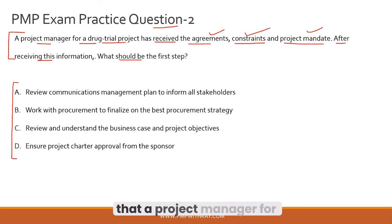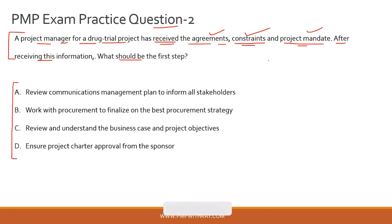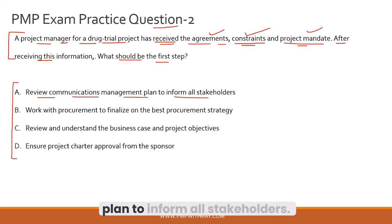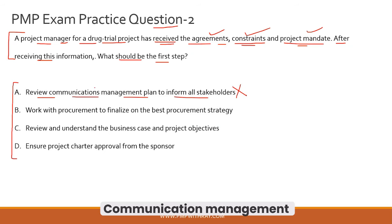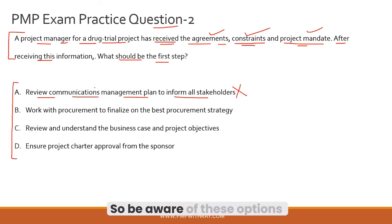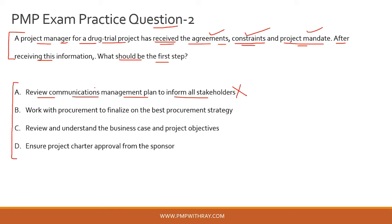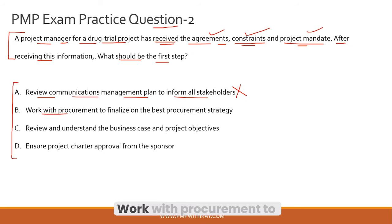The question asks what should be the first step after receiving these artifacts. Option A — review the communications management plan to inform all stakeholders — is incorrect, because you are still in the initiation phase and the communications management plan has not yet been prepared. Be aware of options presenting artifacts that haven't been generated at a particular stage — this is a classic wrong answer choice.